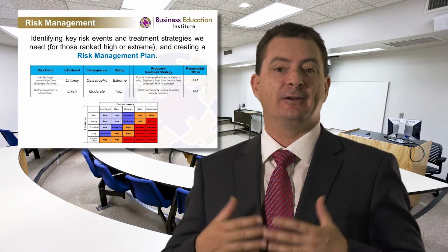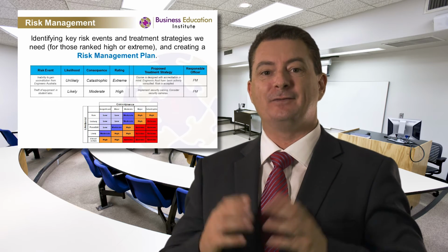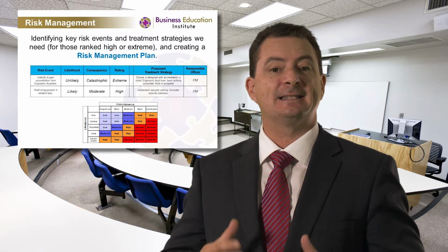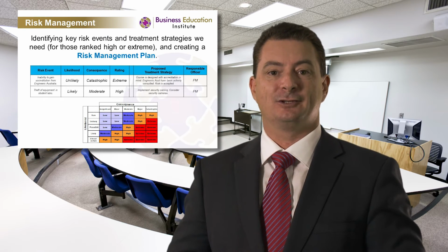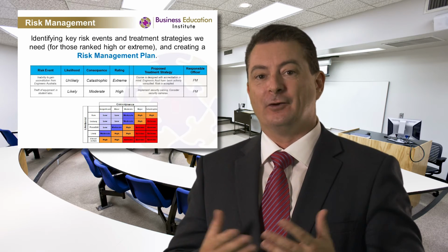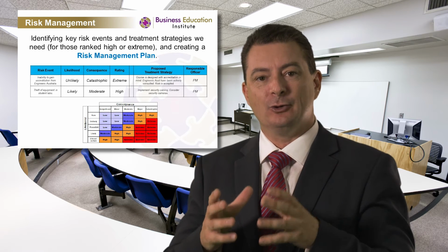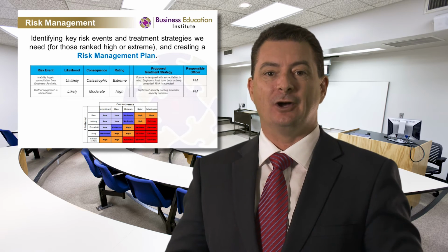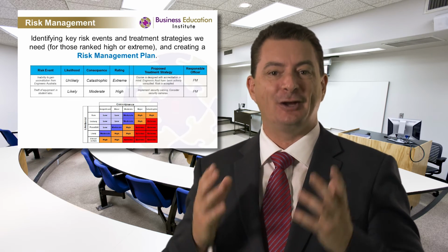And then we look at risk management. There is an ISO standard, 31000:2009, and that ISO standard basically sets out that we have to look at a context to the risk environment we're working in. For example, if you were building a building in your country compared to building the same building in a war-torn zone, the context of the risk has totally changed.